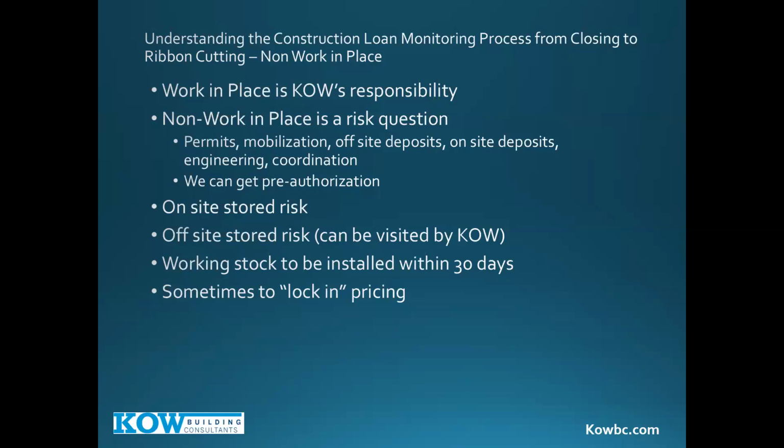Very often, we'll also call something working stock. Working stock is material that's ongoing, being installed, the sub is mobilized, and we expect it to be in within 30 days. Some clients can allow us to call that work in place, some do not. But that's kind of what we call working stock.